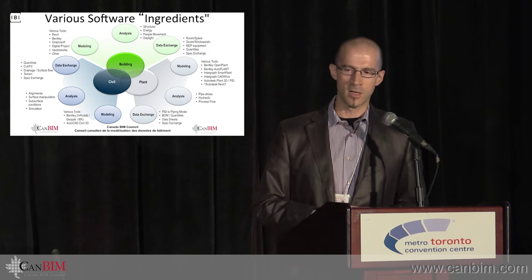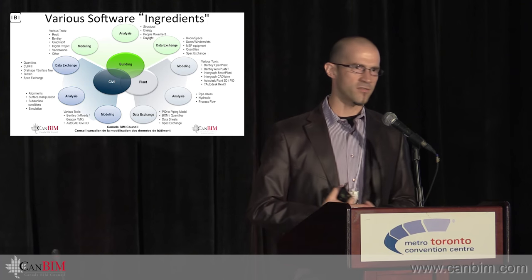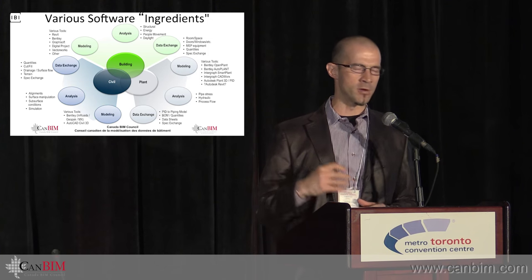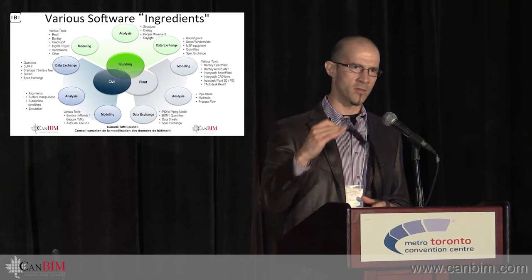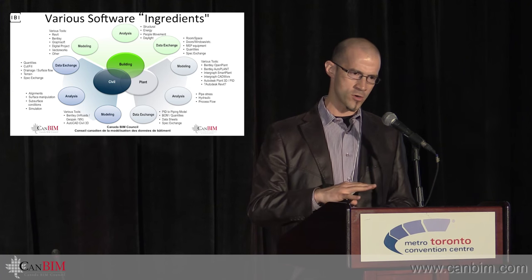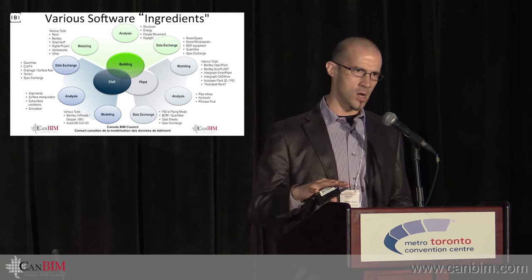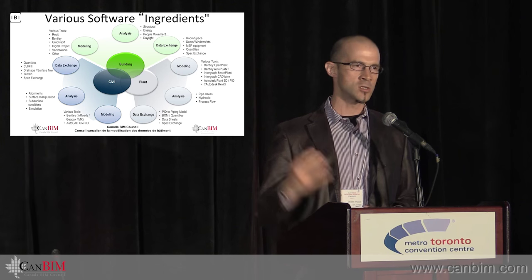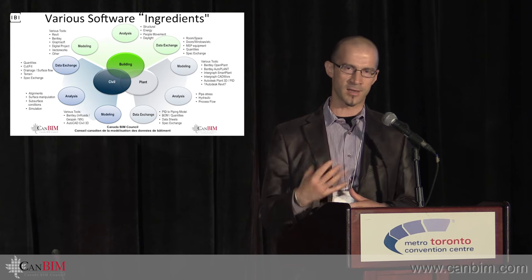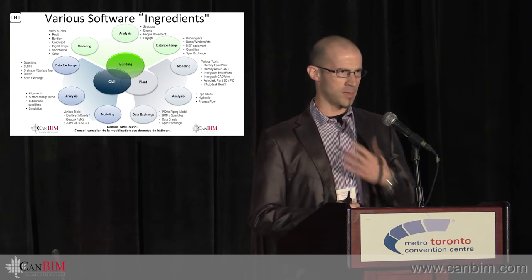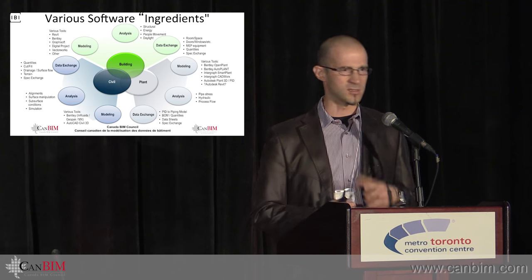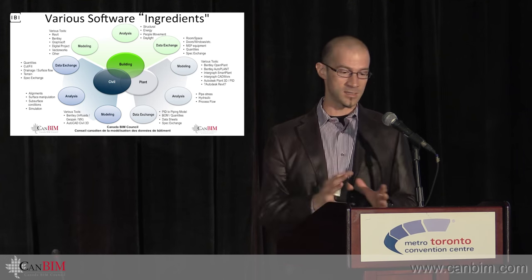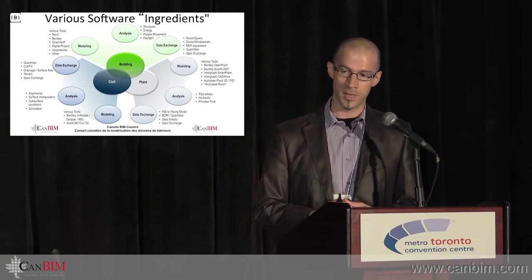So on the civil side, you've got your geotechnical analysis, you can do stratification of site layers. When I was on the Panama Canal, they were extremely interested in knowing what are the various layers of the earth and how much basalt content is in existence at a certain depth in the canal range, so that when they're starting to dig for the lock system, they can account for that accordingly. And for me, being an architect by trade, I thought, okay, that's rather obscure, but it was quite important, and it would have saved millions as they discovered where those basalt deposits were.